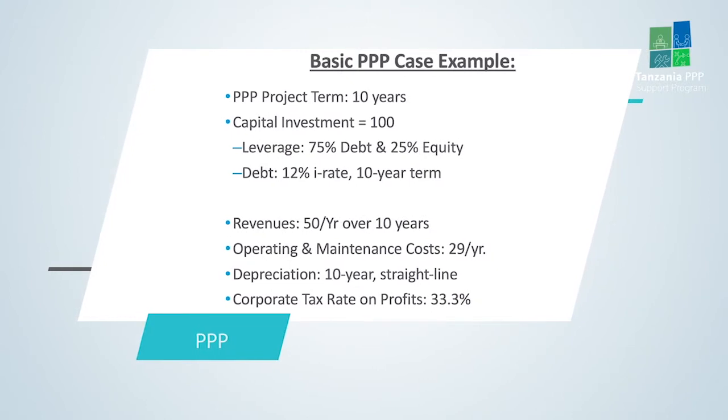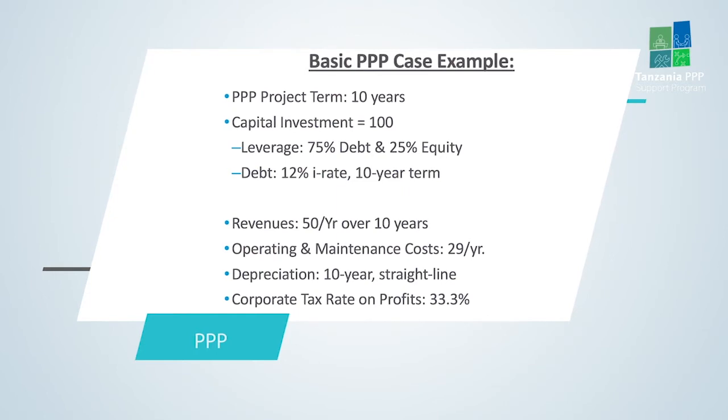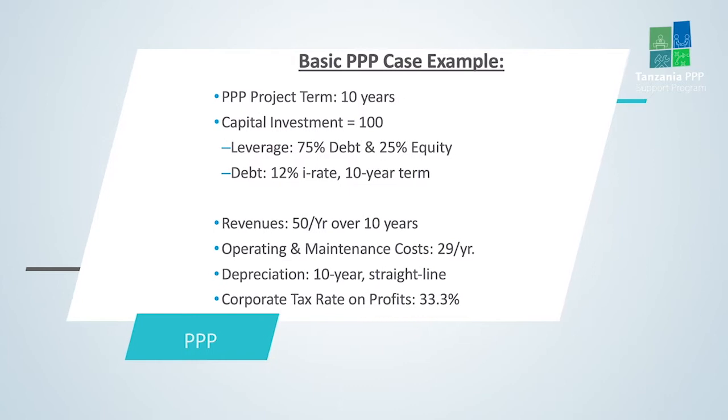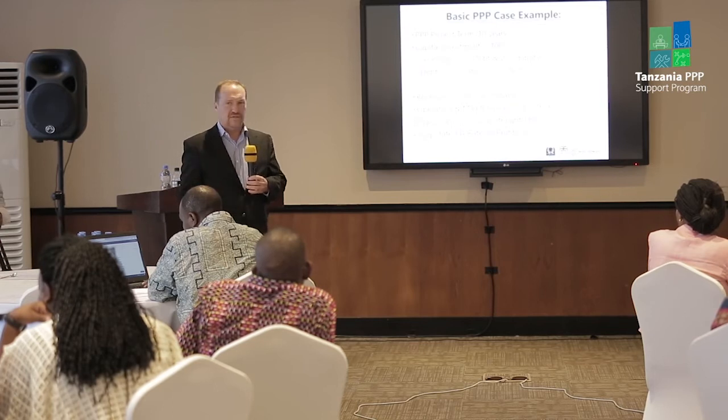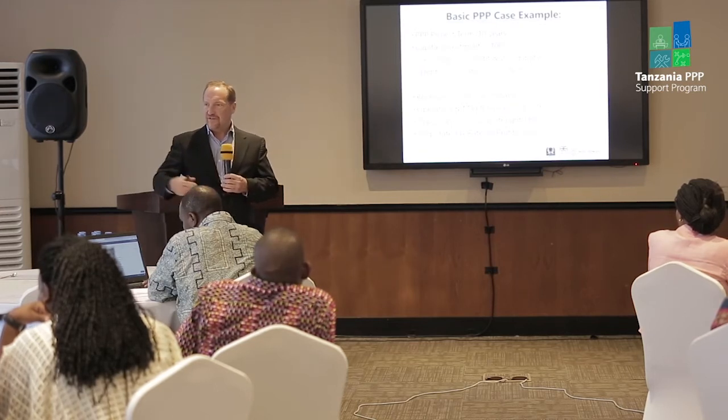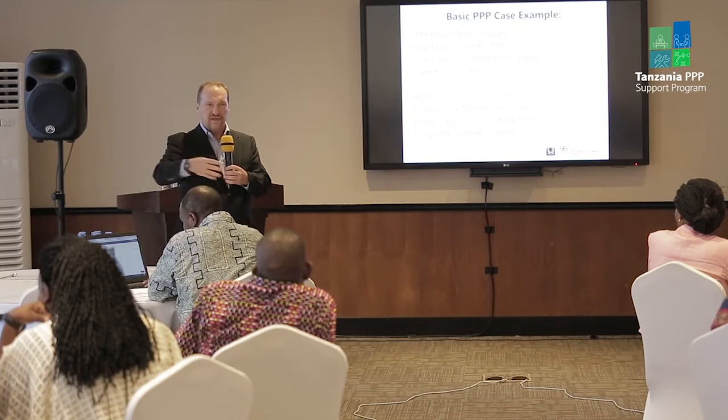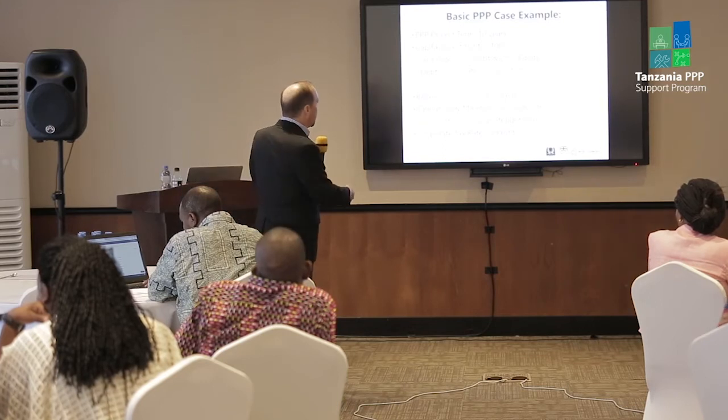There is more debt. We say that we're using a smaller amount of equity, leveraging it to raise a much larger amount of debt. That's what you typically see in a lot of infrastructure projects. Equity is more risky, requires a higher rate of return. It also tends to be more scarce or difficult to source. You don't just have lots of people with plenty of equity who can fund things 100% equity.